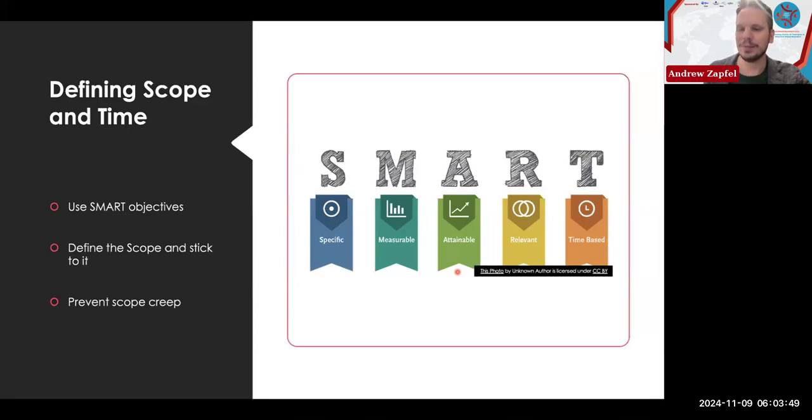Measurable, again, how would I be able to know that you've accomplished this objective? Maybe, as we're saying more about raising awareness, we're going to host 5 radio spots or have 5 radio talk show engagements in the next 6 months to raise awareness on newborn screening. Great, 5 radio talk shows. If you've shown me the 5 radio talk shows, you have recordings, great, you've done that. It's measurable. Attainable, again, as we talk about that critical thinking, can you accomplish this? Is this possible to do